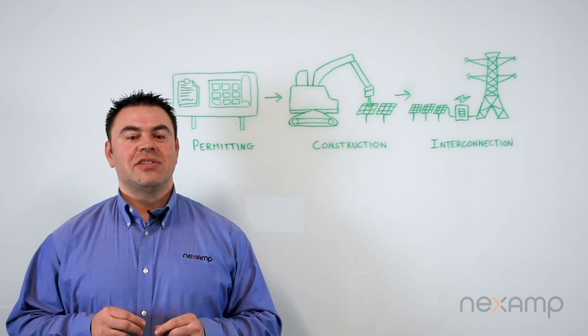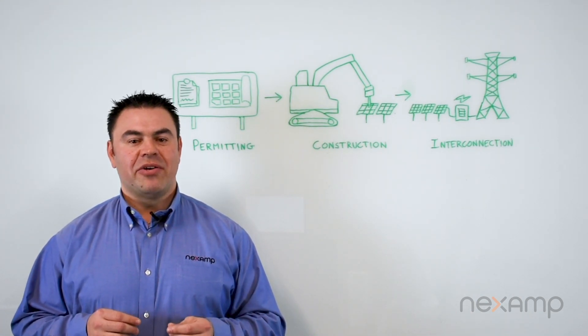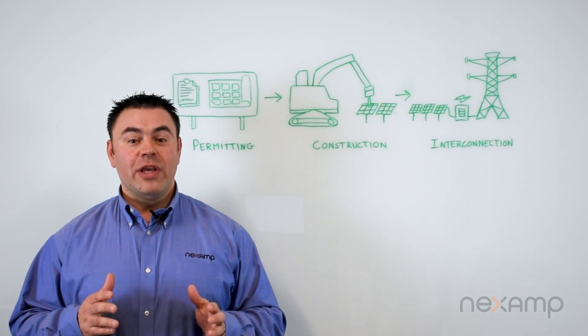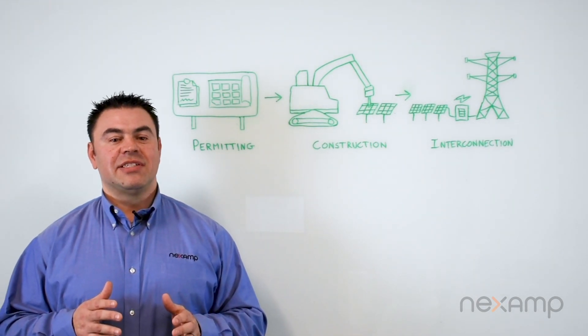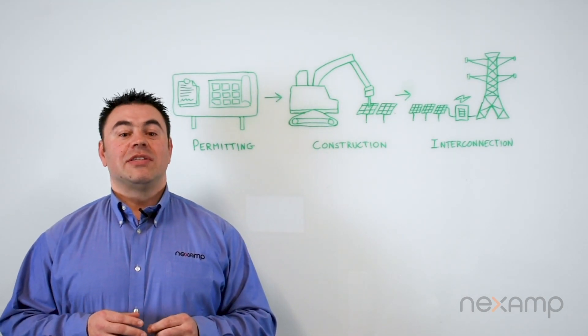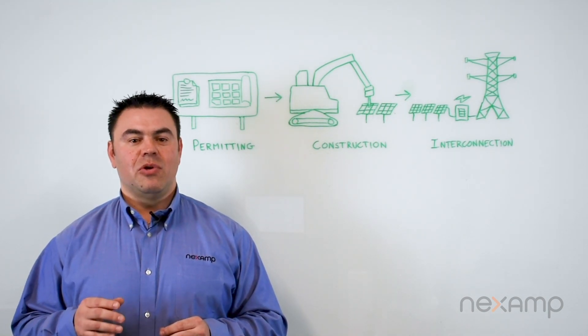A NEXAMP construction supervisor is on site daily managing and monitoring the installation of the equipment. Next, we conduct tests to ensure the array is working safely and properly, and because our crews are working year-round, we sometimes schedule extra time due to weather delays.